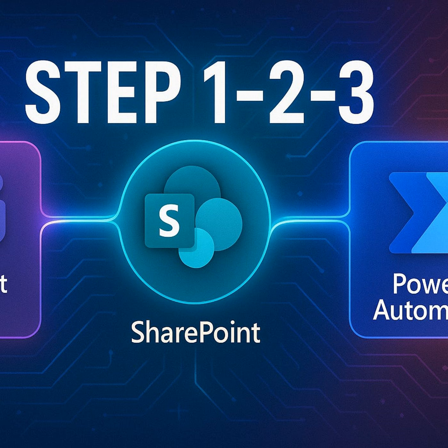The second principle is minimal duplication. Duplication isn't just annoying, it drains hours from every week. If a project manager has to update 3 separate places every time something changes, they either delay updates or prioritize one location, leaving the others inconsistent. Instead, the system should be designed so that automation carries updates forward. A document approval in SharePoint automatically posts in Teams. A task progression triggers status changes in the tracker without manual edits. Reducing manual duplication isn't just about efficiency. It prevents the confusion of wondering whether the spreadsheet, the board, or the chat message is correct. Automation builds reliability into the system by syncing data through design, not memory.